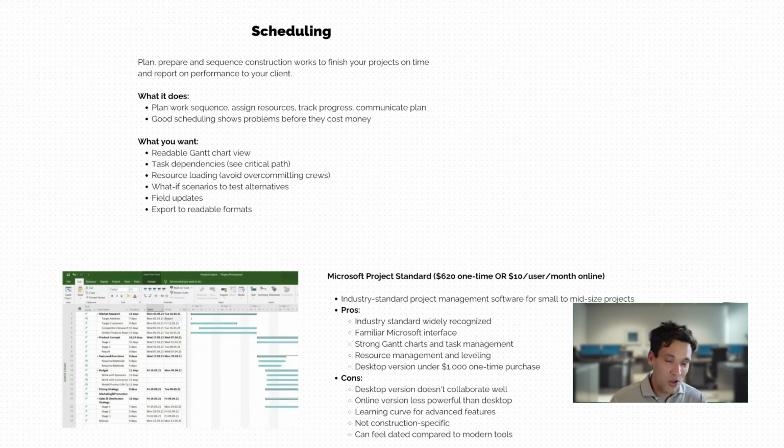So a lot of contracts actually mandate, even if you don't do it, that you need to provide an updated schedule to your client every 2 weeks. If you're relying on your client for access and you don't have a schedule and you can't prove you've been delayed, you're missing out on claiming a lot of money.